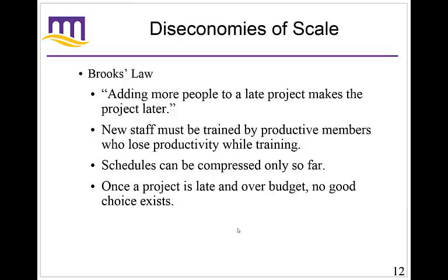So the more people you add, the longer a project is going to take. And specifically, the more people you add late in the project. If you had all these people trained right from the beginning, it might have been a different story. But adding them as you go is inevitably going to cause problems.